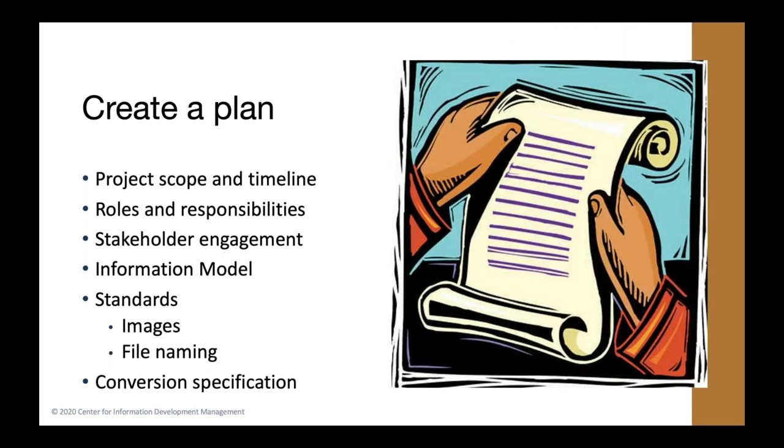Just like any project, creating a conversion plan document is the key deliverable. Good project planning for any project always includes these steps. Think of the project plan as your roadmap with your articulated goals. Include the stakeholders and how they will benefit from the goals. Break the project into a list of deliverables that are needed to support the goal and the tasks needed to complete those deliverables. Just bear in mind that the conversion of your content corpus is just one work stream within the overall migration to DITA efforts. For the other work streams, such as writer preparedness, publication back-end preparedness, as well as tool selection, you should probably plan on having a project plan which covers these same basic pieces for each one of those work streams.